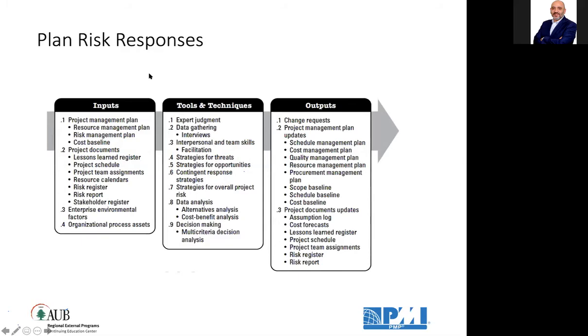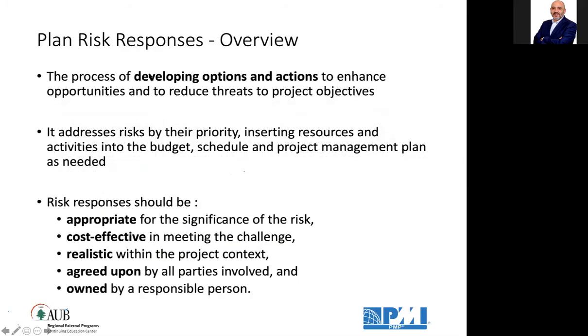Plan risk response: we take the prioritized risks and develop options and actions to enhance the opportunities and to reduce the threats. It addresses the risks by their priority, inserting resources and activities, whether to react or to prevent, into the budget, the schedule, and the project management plan as needed. Risk responses should be appropriate to the significance of the risk.